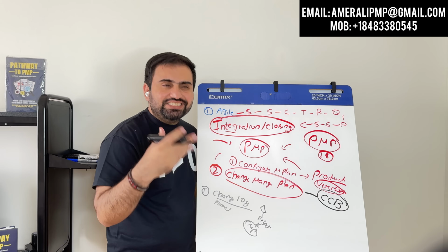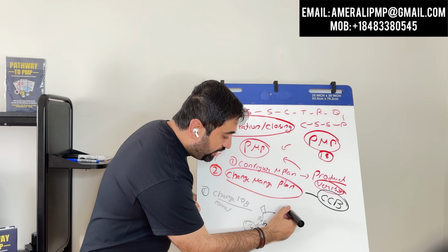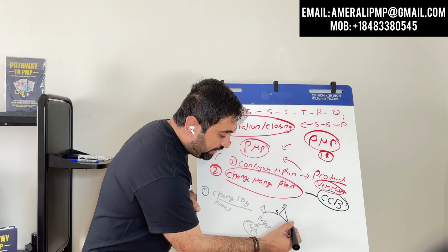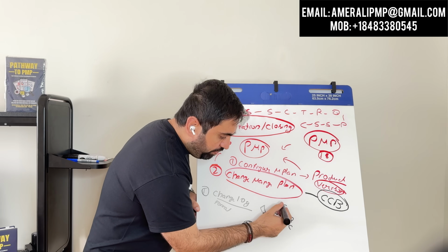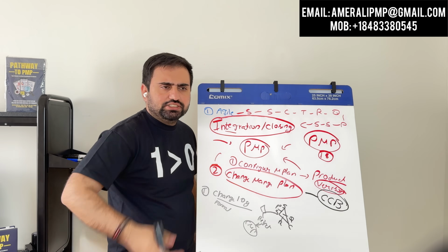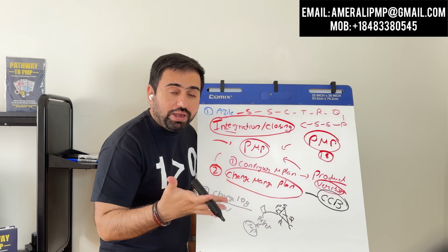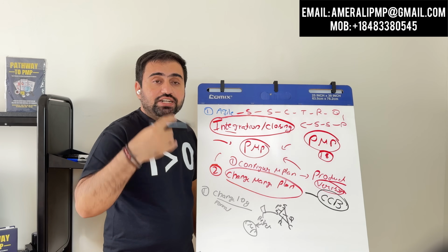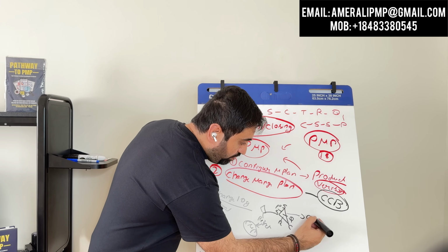But if he thinks, okay, that change is good, it is impacting the deliverable or it is needed, he will do the impact analysis. Scope impact, how it impacts scope, schedule, cost, quality, risk, procurement, customers, all the constraints. All the constraints will be checked for the impact, how they are impacting the project. Once he thinks this change is needed and he has done a detailed impact analysis, he will send it to the change control board.